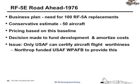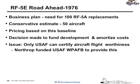The business plan was, with 100 aircraft plus out there of RF-5As, we felt that 50 aircraft was reasonable, and we priced the effort on that, amortizing the development over 50 aircraft. And the decision was made by Northrop to do that. There was one other issue. All weapons aircraft certification has to be done by the Air Force. So on a different turnaround, Northrop funded the Air Force at Wright-Patterson to do an engineering review of all the data, monitor the flight test program, and give us flight certification.